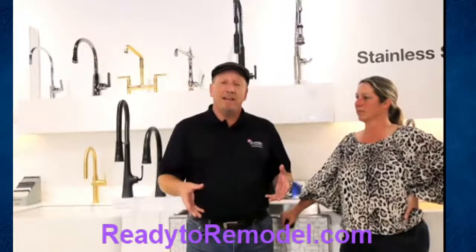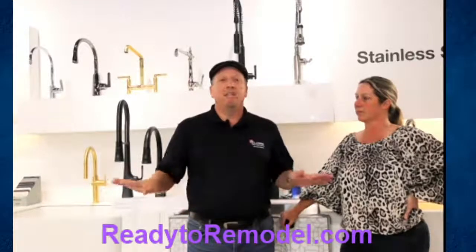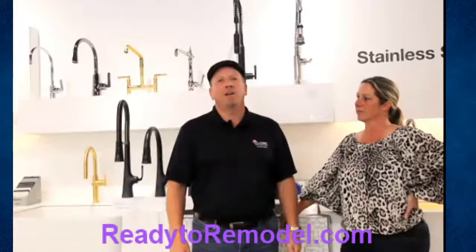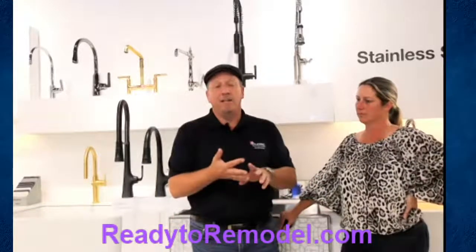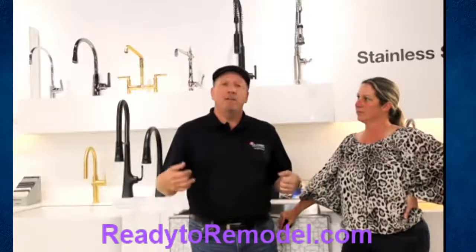The downside of that is you have to interview them. You have to try and get them to show up. You have to manage their work and make sure that everybody does what they're supposed to do. If you don't want to do that and you've got maybe a kitchen, but nothing is moving around, no walls, no windows are changing, you could use a kitchen and bath contractor. They're typically general contractors, but they're very familiar with how to do a kitchen or a bath. So you could get them and they can replace your cabinets and your tile and your plumber. They're going to bring all the different licensed people in. You don't have to do that yourself, but you can use them.